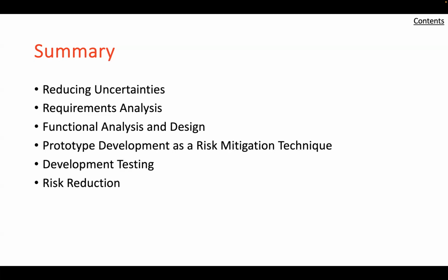In terms of development test, validation test to confirm resolution of risk requires the development of a formal test plan, the TEMP, the test and evaluation master plan. Furthermore, test equipment must be developed, validated tests must be conducted, and test results analyzed and evaluated. The results of the testing lead to the correction of design deficiencies. However, special test equipment and facilities often represent a major investment. Therefore, early experimental exploration of interface designs is essential.